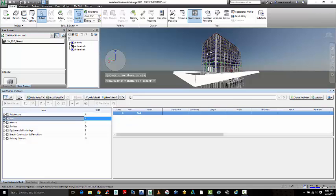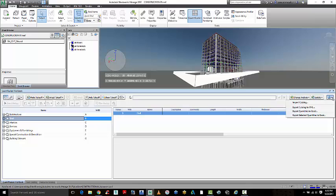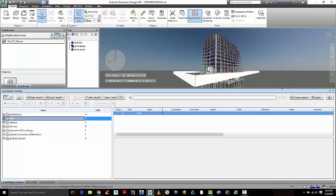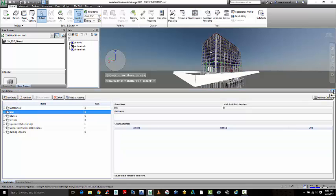You can go through the model and do takeoffs and it will extract that information about the length and the width and the volume and the weight of certain objects and load them into this workbook which you can then export out as an XML or an Excel spreadsheet. So this is a really powerful tool that comes within Navisworks for doing quantity takeoffs.